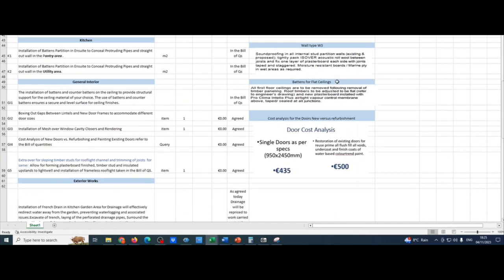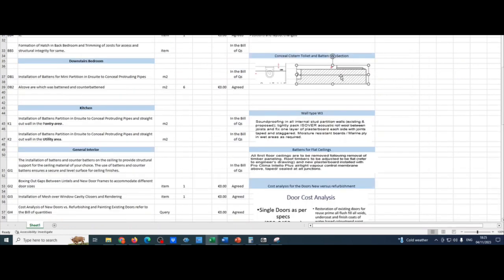So it's about taking the areas, finding specifications, relating them back to the drawings, showing transparency so everybody can see where and what they are, and then there's very little need for argument or disagreement. The rates are then taken from the bill of quantities, which are part of the contract, as are the specifications, as are the drawings.